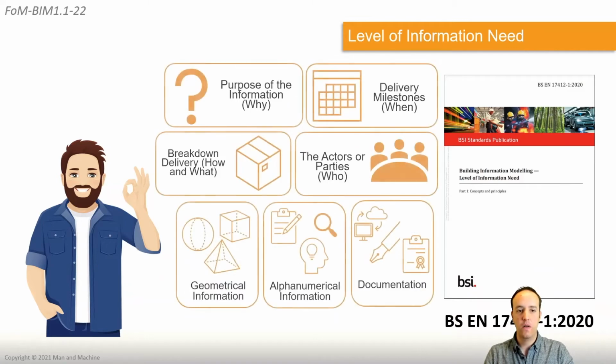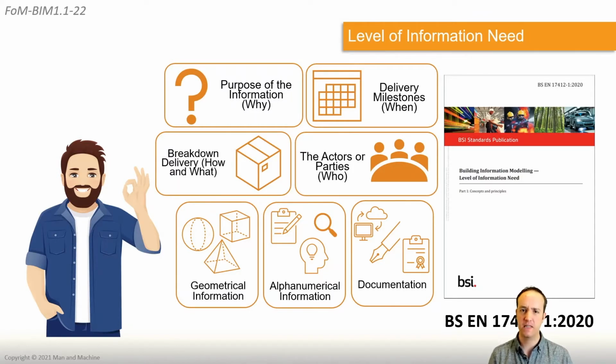So what we have with that is a load of specific questions. So, okay, why is that information there? Why do we need that information? When do we need that information by? Because providing 100 properties at the start of the project is a waste of time, pointless. Providing them at the end is very useful. And it's about staging the right information at the right time.